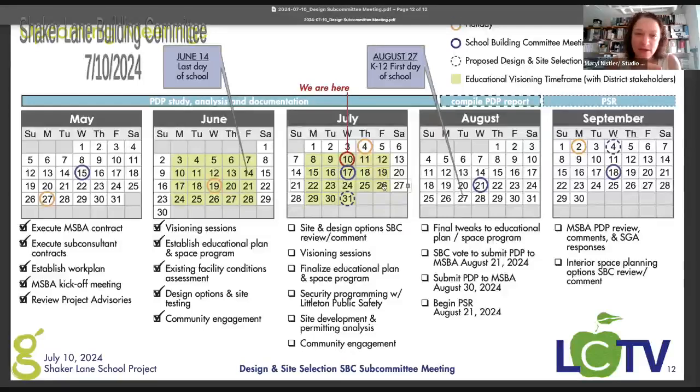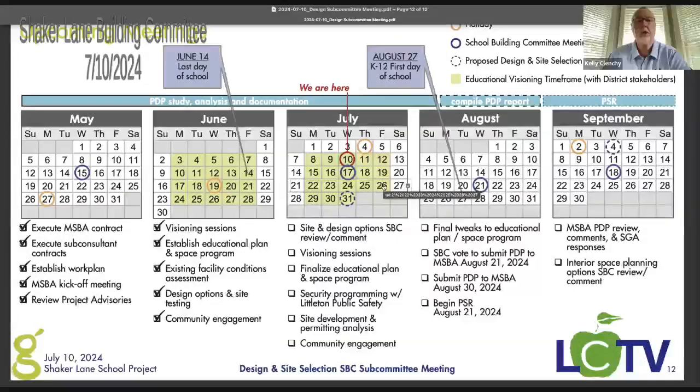So it'll take us a day or two to scrub it through, make sure it's accurate, make sure we agree with it, make sure that their understanding of our design is appropriate. We'll do that on the 29th with our OPM and the estimator. We'll also scrub through it with us, and then we'll have it available for the 31st to review. So it'll give a little bit more substantial information as far as cost goes at that time.